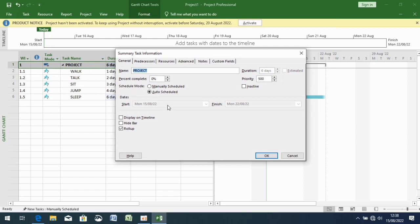Here you'll see 'Percent Complete', which starts at zero percent. You scroll up to the percentage given in the question. For example, if it's 100%, you keep going — 25, 30, 35, 40 — and if it's 50% you stop there. We're assuming it is 100%, so when it reaches 100 you click OK.